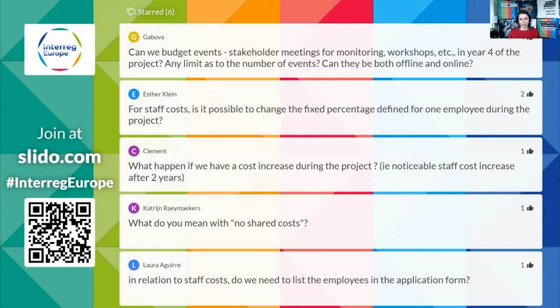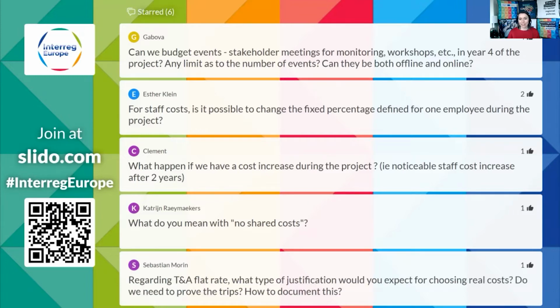Our participants are very active in answering this question, and let's have a look at the answers. So, Ilaria, 88%, 89% of the ones who answered say that no, they don't need to provide all the travel tickets in case the flat rate applies. Is it correct? It is correct. So no travel tickets need to be collected or provided if the flat rate applies.